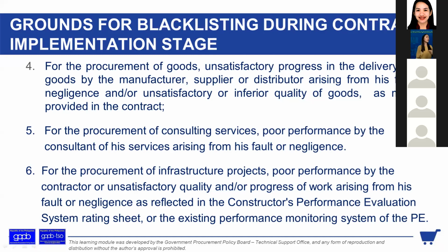You can require the consultants to report on certain days and time for updating of the output, no? Pwede niyang yung deliverable niya. For us to make sure na within siya sa track ng project. But if he cannot deliver due to his own fault or negligence, then that is a ground for blacklisting. Hindi na nga nagpapakita, wala pang na-deliver. Tayo naman, bayad tayo ng bayad.